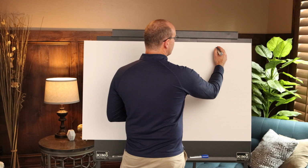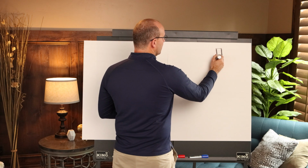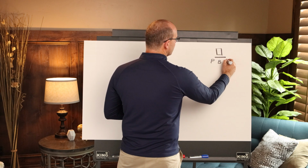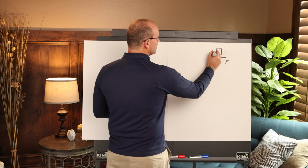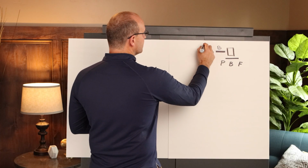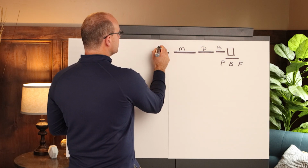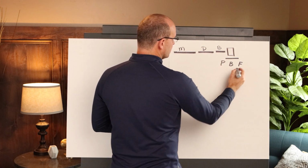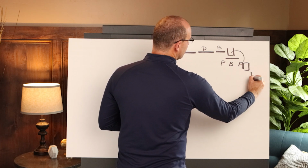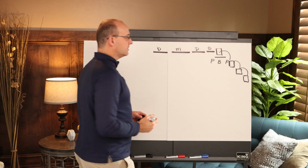We have the work package that we're talking about, and we have to make sure that we have the ability to build by planning this first, building it right, and finishing as you go, which means that you'll need a buffer out in advance, and you will need to deliver the product, make the product, and design to that work package. And then that wagon or work package will repeat from zone to zone to zone on a rhythm. So that's what we should be doing.